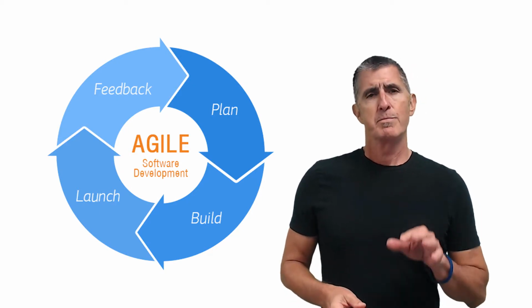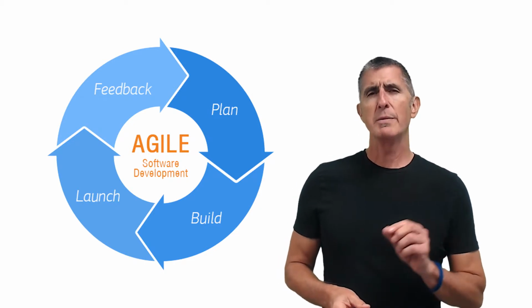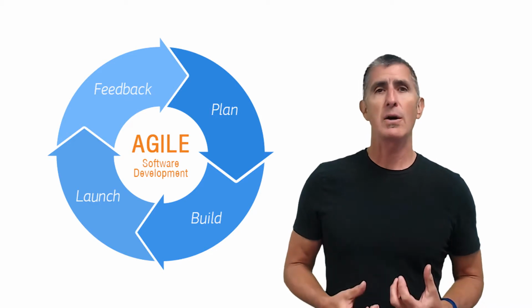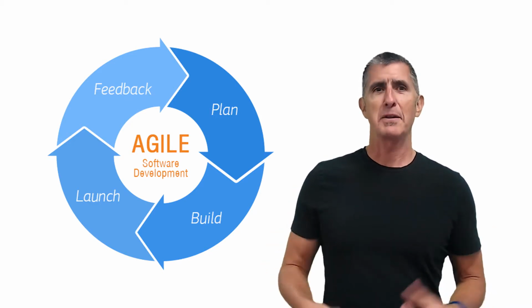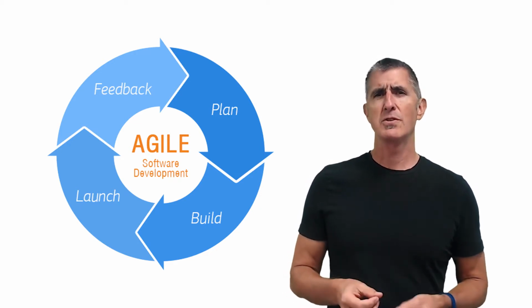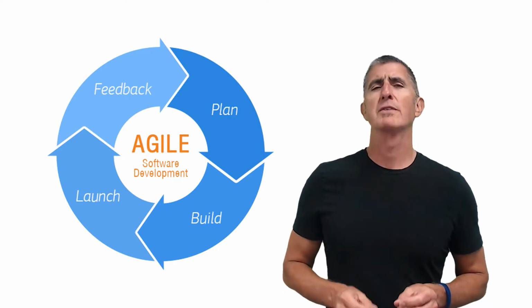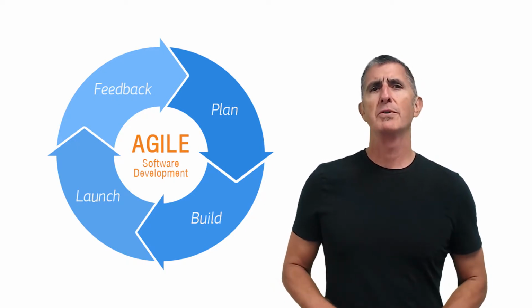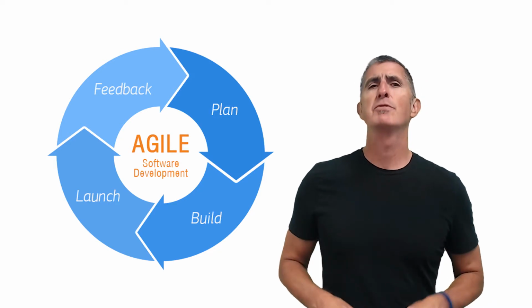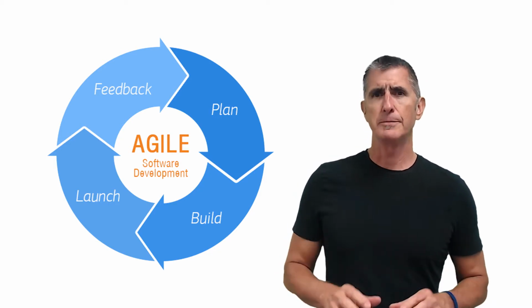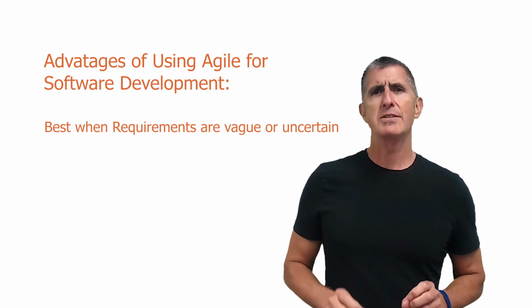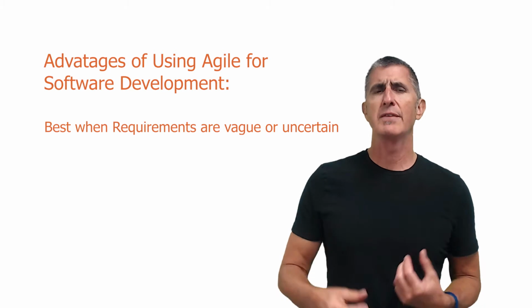projects. Unlike some projects where the requirements can be and need to be very detailed, like building a house or launching a satellite, building software, creating a software application or service usually means you'll have a rough framework of requirements, but much of what you're building will get its shape from iterating, testing, and improvements made from feedback along the development lifecycle. This iteration and feedback mechanism is what separates Agile from the predictive or more process-driven lifecycle models, and